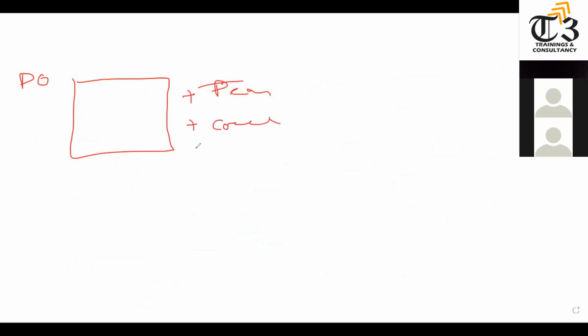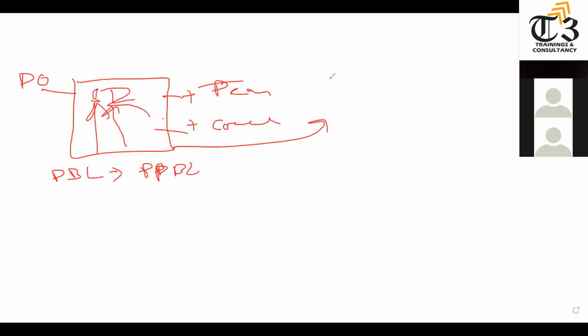Once the product owner prepares the product backlog, the team and the coach will sit together, and there could be other stakeholders also, but we are just focusing on these. Now they will convert this product backlog into a prioritized product backlog, where they will arrange it based on highest value and highest risk. Then the team will take the work from the prioritized product backlog and break the user stories into tasks. In work breakdown, we have the work packages.